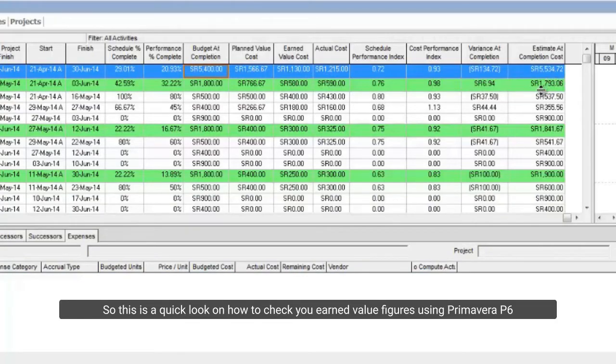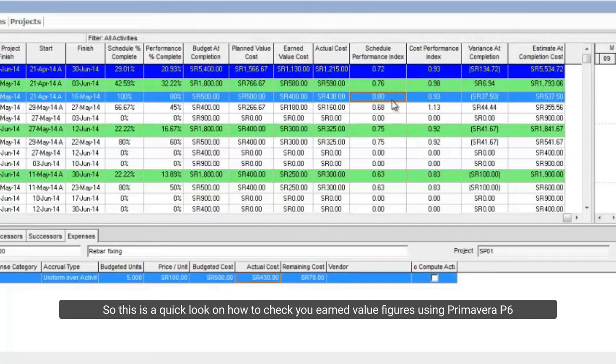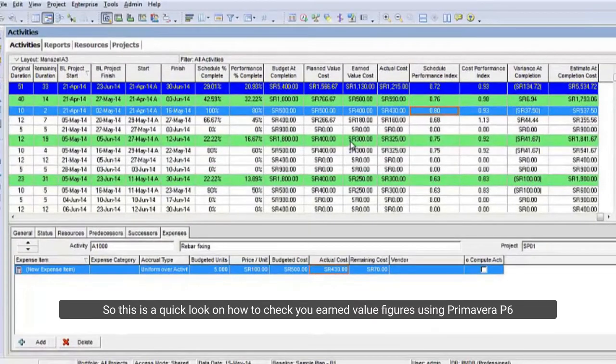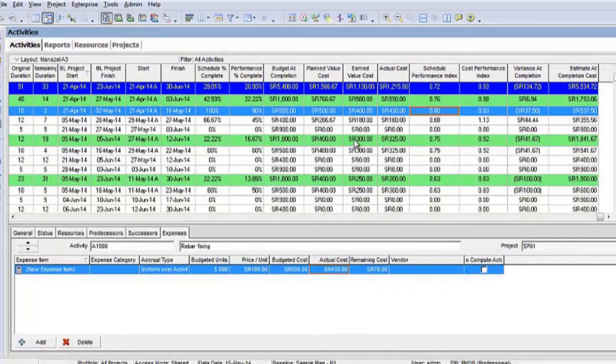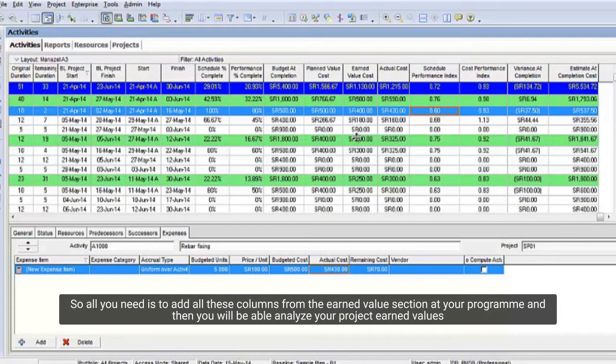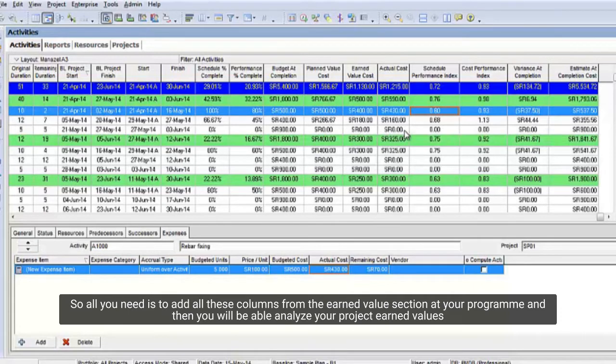So, this is a quick look on how to check your earned value figures using Primavera P6. All you need is to add all these columns from the earned value section at your program, and then you will be able to analyze your project earned values.